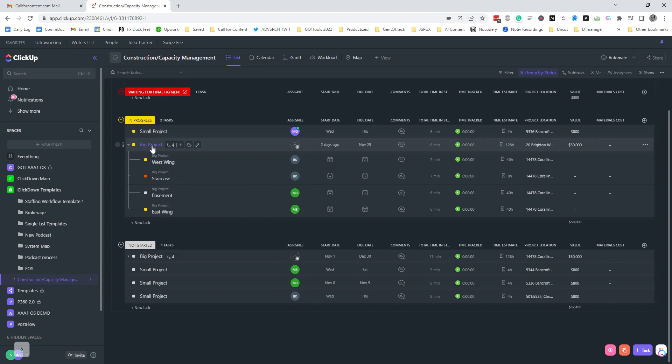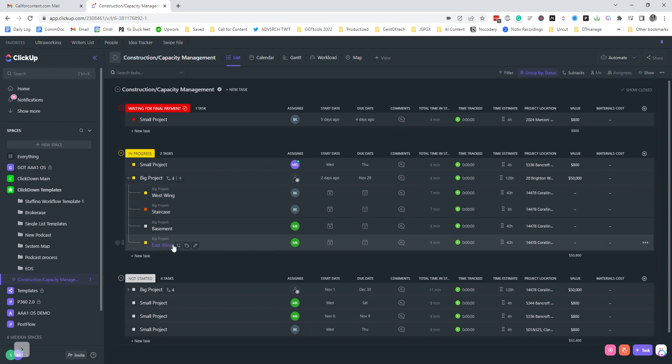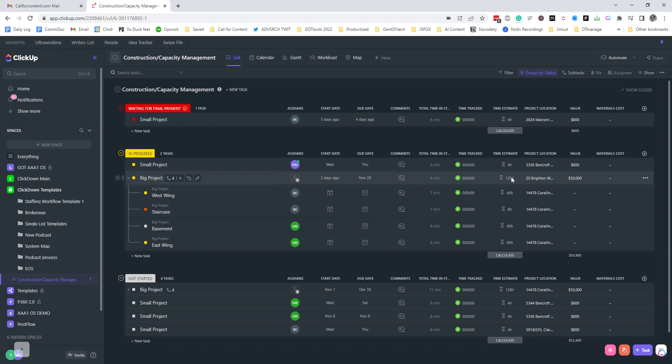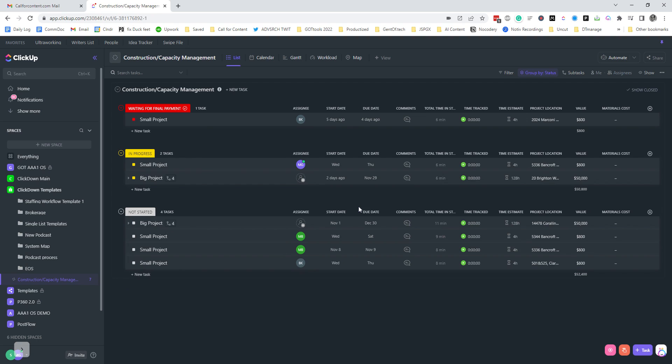So you'll see here this big project has multiple pieces, and each piece has its individual estimate which then rolls up to the big project. What else have I got in here? I've got time estimates.